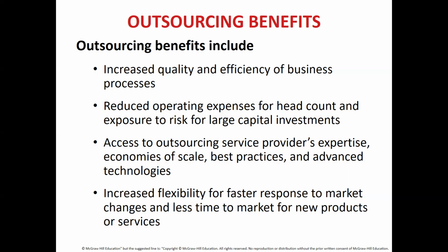Now what happens is this: when you're outsourcing something and the project fails midway, you can always get back the entire set of money as per the SLA, service level agreement. Now here's the thing: if you're doing it in-house and something goes wrong, all your money is lost. You have no one to complain to.